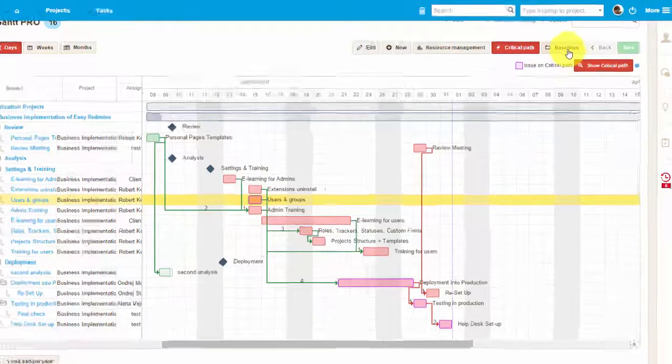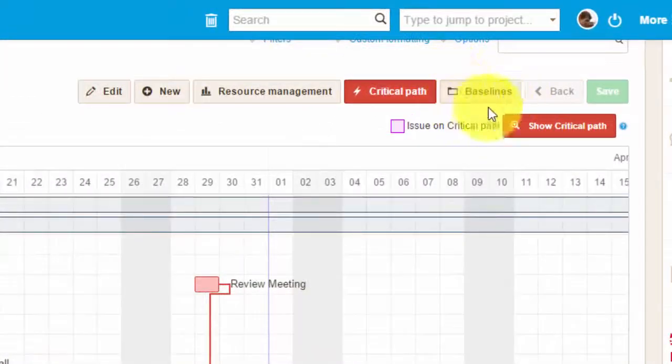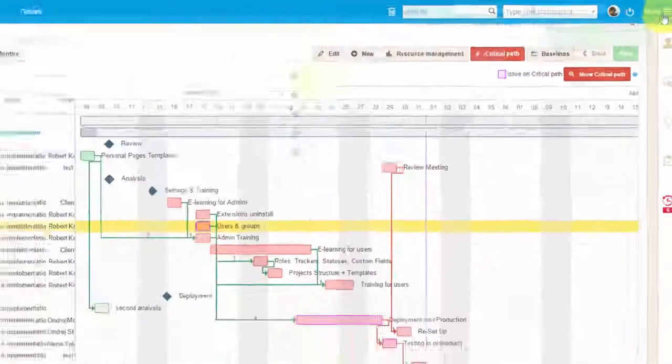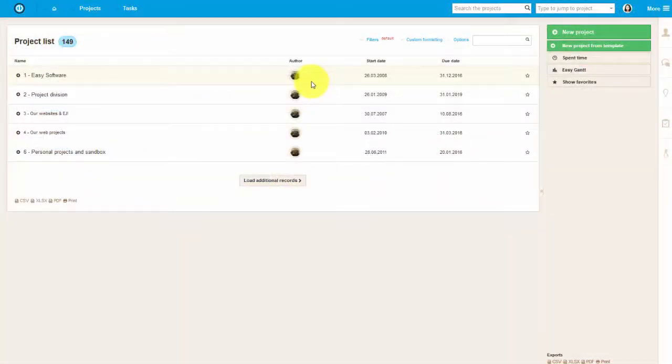Also, you can use baselines. It will allow you to compare your actual project delivery with your plan.